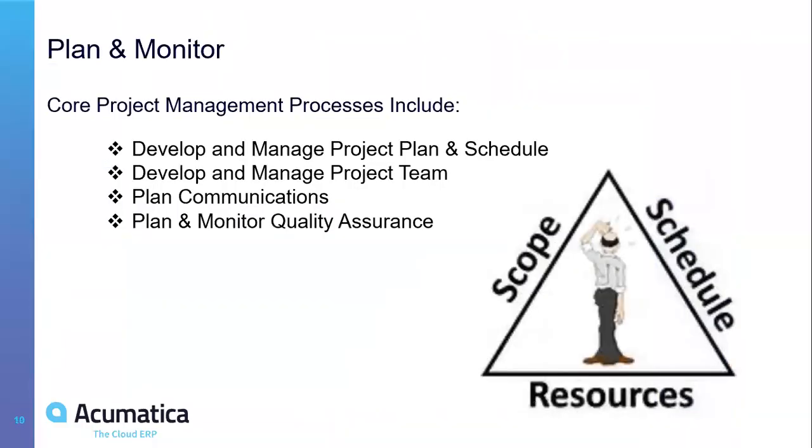So what are the core tasks meant with your project management or core project management process? Number 1 is the project management plan and schedule, and I discussed this already. The importance to do this, this is your first step. When you get the information, oh, we have a new project, we are implementing, this is the customer, and we decided you are the project manager, take the statement of work, take the service estimation, and use this base information to put a plan and schedule in place. And then for sure agree this schedule with the project manager of the customer before the kickoff meeting.